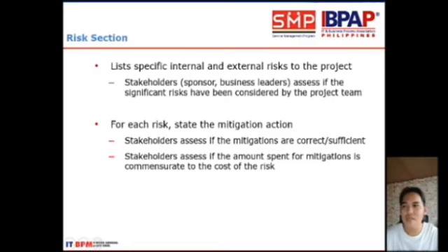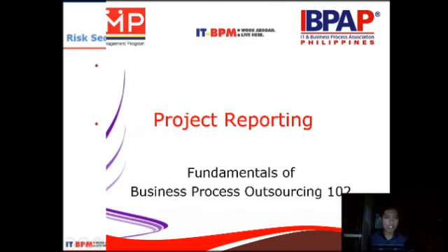You have to list down the possible risks that can be encountered specifically, and for each risk, state the mitigation actions, and let the stakeholders assess if the action is correct or sufficient, and if the amount spent for mitigations is commensurate to the cost of the risk.